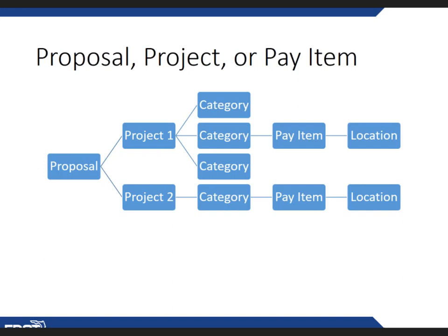However, inside of the pull box, you may find wiring, and it's usually for a sign, a signal, or a light. So if the contents of your pull box are used for lighting, your pull box needs to be loaded in the lighting category, and it needs to have the appropriate locations identified for those lighting pull boxes.